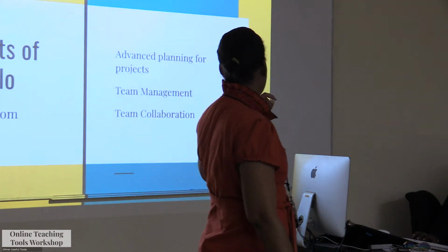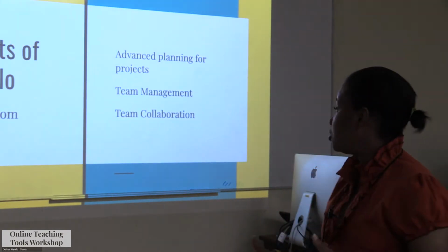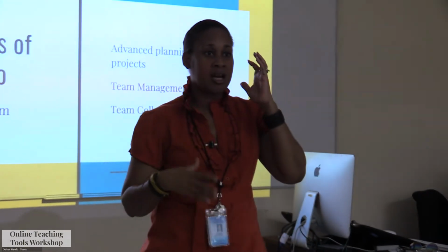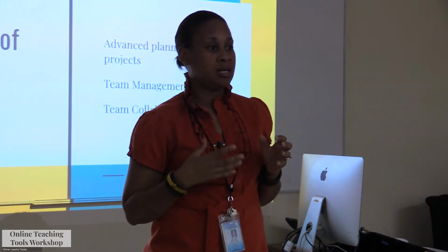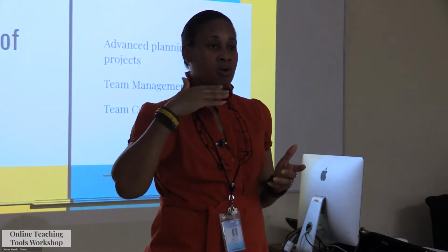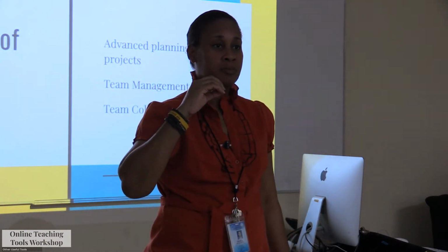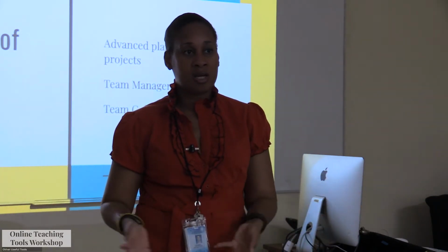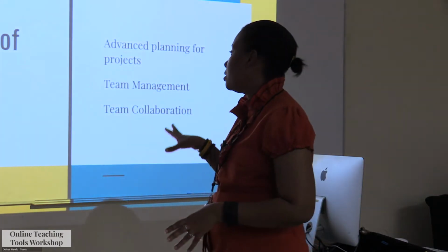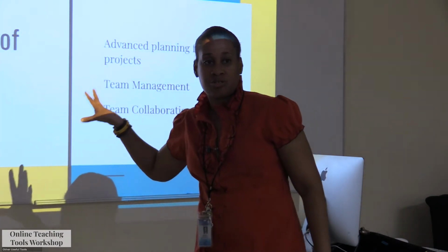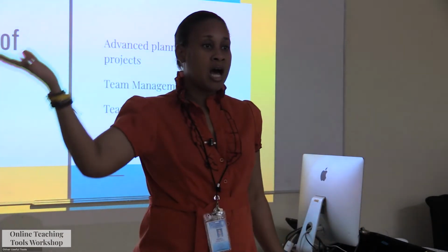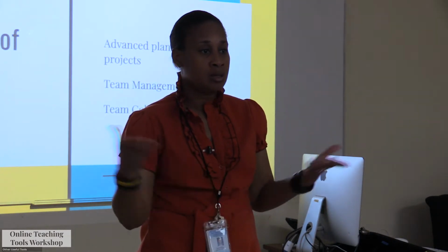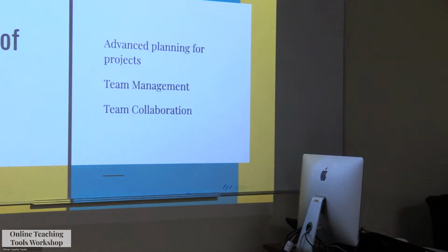So it offers advanced planning for projects, team management, of course, and it facilitates team collaboration. And the only thing that I always recommend when I say put together your Trello is to always elect a team leader. They must elect a team leader. That team leader collects the email addresses of the team, creates the project in Trello and then invites the team into the project. Afterwards, they can lay it out how they want, but there must be one person doing that activity. So let's look at Trello.